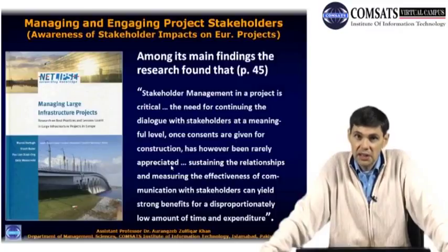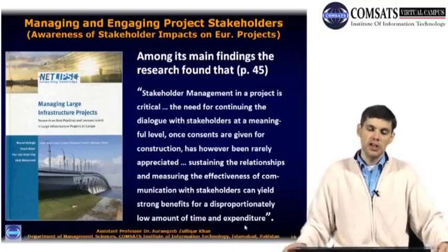Rarely appreciated, seldom appreciated. Sustaining the relationships and measuring the effectiveness of communication with stakeholders can yield strong benefits for a disproportionately low amount of time and expenditure.